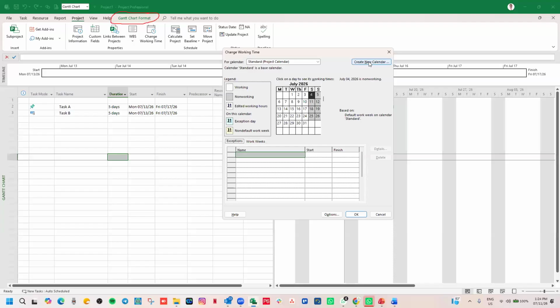So we come here, create a new calendar. You click on it. Do you want to create a new base calendar, or you want to make a copy of the existing calendar? And the existing calendars can be 24 hours, night shift, or standard. See, this has already been done. The basis is there. The background is there. The configuration is there. You just want to copy it and update it or change it. It is easier that way than to create a new base calendar.